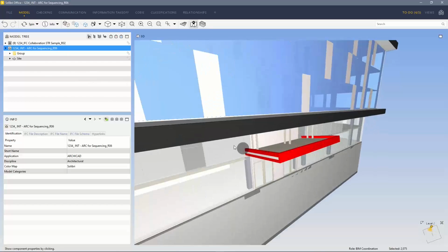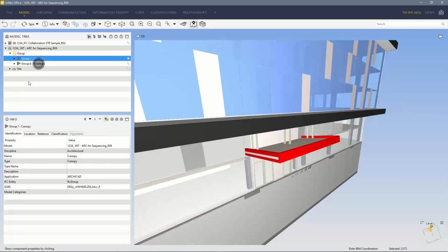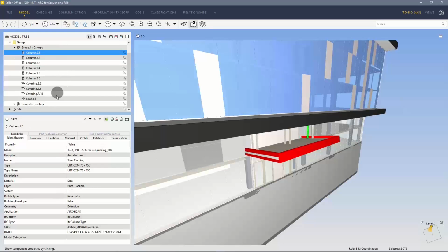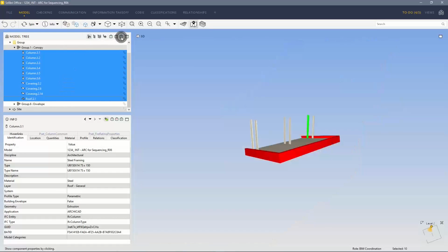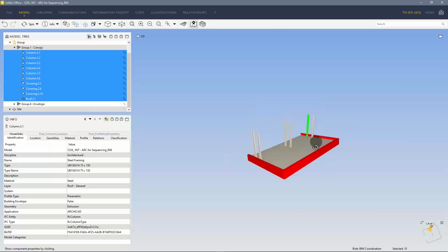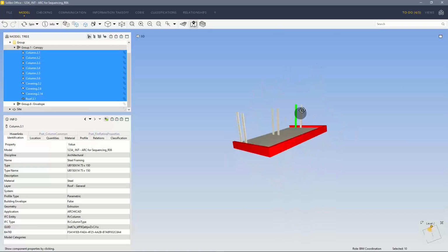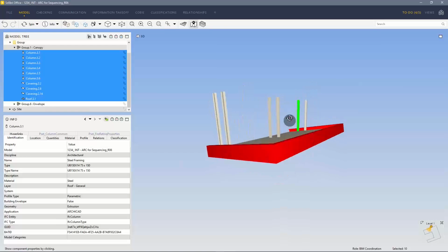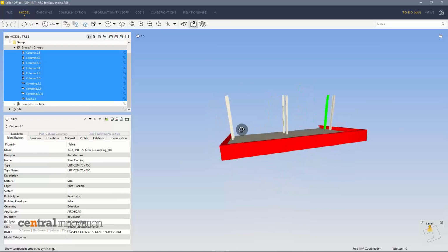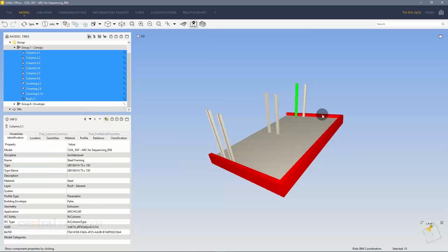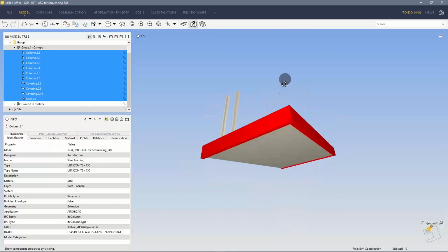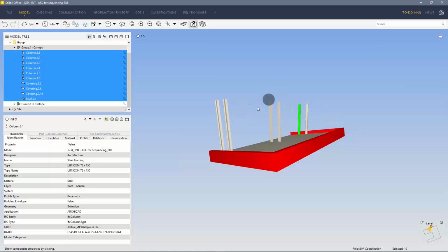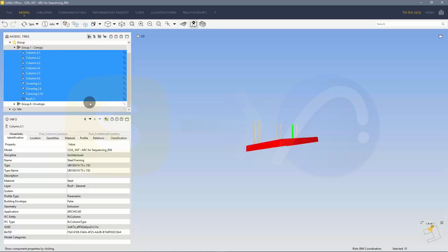For instance, this canopy here, I have it as a group that I built inside Archicad, not an Archicad group, but an actual Ifc group. And we have built this bunch of elements as if it was an individual group of parts. They're not technically speaking assemblies, but you can call attention to those and say, hey, this should be an individual item, and then probably pass the information that you want this to be built by a specific person or a specific company, and so on.